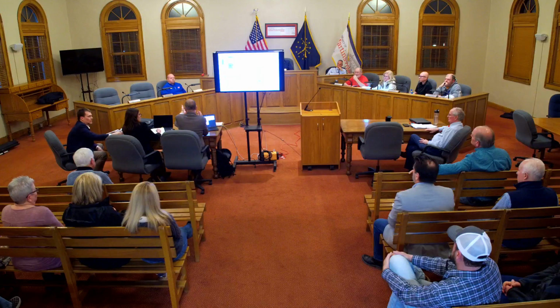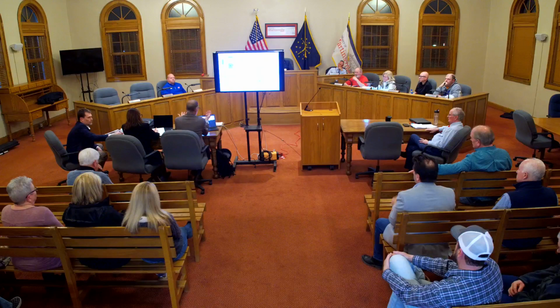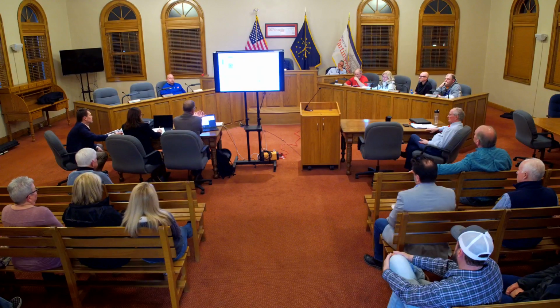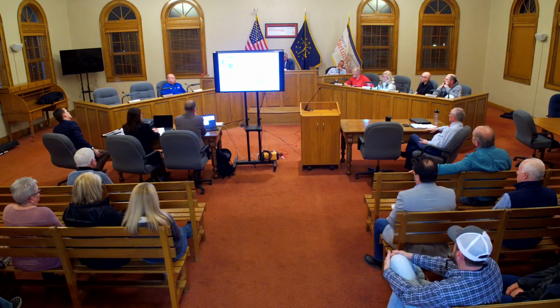And then there's another number that says, especially on first floor, not so much on this floor, if we did want to do some reconfiguration to make some things work more efficiently and effectively, what would that cost be? And so the full-blown thing is those 2 numbers added together, and then this group has the ability to make some choices and decisions based upon some data about what's happening inside this building, and not just some theoretical number out there. Bring it back to where it's workable, something that's going to be reasonable.